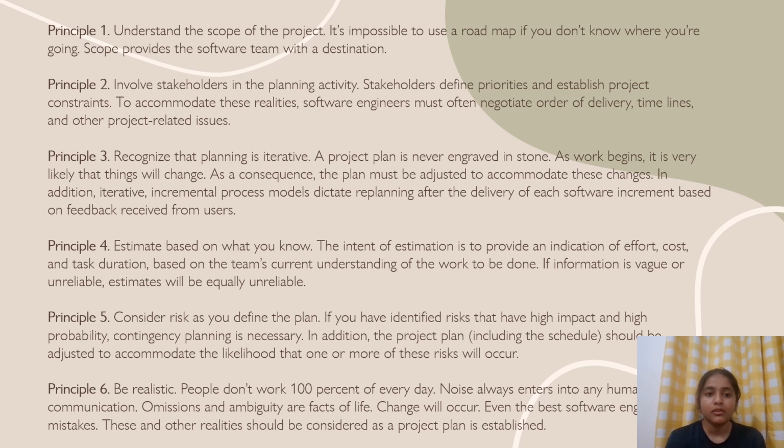Principle 3: recognize that planning is iterative. A project plan is never carved in stone. As work begins, it is very likely that things will change. As a consequence, the plan must be adjusted to accommodate this change. In addition, iterative incremental process models dictate replanning after the delivery of each software increment based on the feedback received from the users.